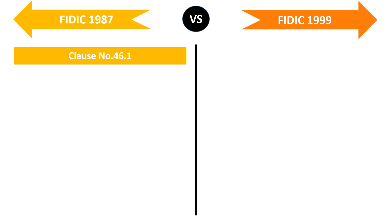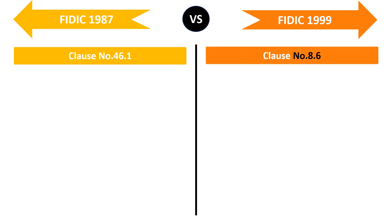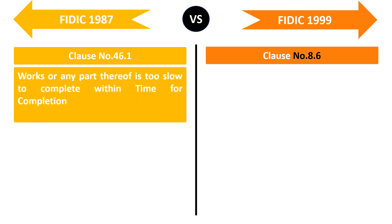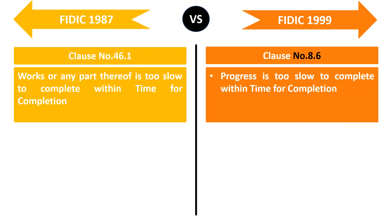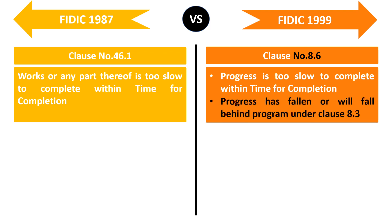In FIDIC 1987 edition, subclause 46.1 deals with rate of progress, whereas in FIDIC 99 edition, subclause 8.6 deals with rate of progress. Subclause 46.1 is triggered when works or any part thereof are too slow to complete within the time for completion. In FIDIC 99 edition, subclause 8.6 is triggered when progress is too slow to complete within the time for completion, and/or progress has fallen or will fall behind the program under subclause 8.3 — an additional condition that has been added.